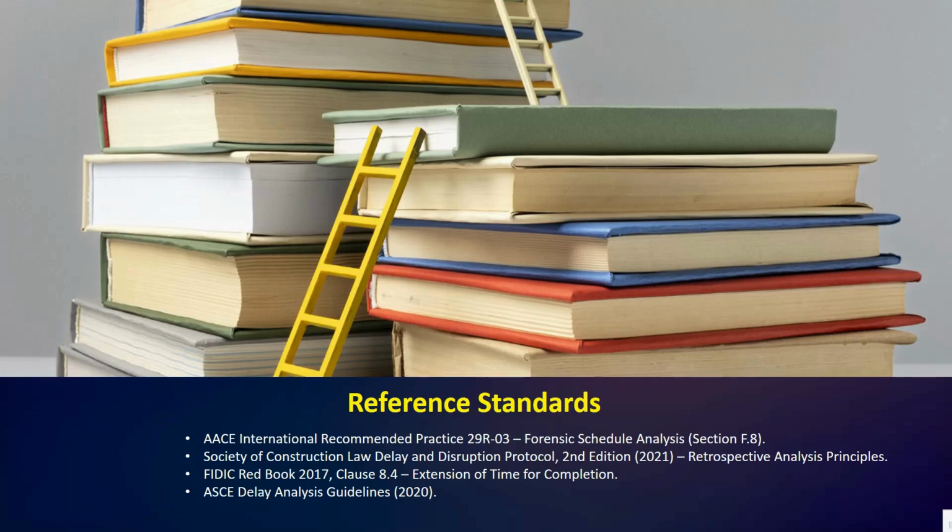Next, we have the reference standards. Here you can see I have added very important reference standards. The collapsed as-built analysis is endorsed by leading industry references, including AACE International Recommended Practice 29R-03, the Society of Construction Law Delay and Disruption Protocol, the FIDIC Red Book, and ASCE delay analysis guidance.